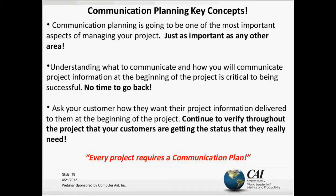So many project managers are reactionary when it comes to red or yellow status — I strongly suggest you put that in your communication plan before the event ever happens, and you'll be able to react accordingly. The key point here: every project requires a communication plan. You'd be surprised how many projects miss that. A lot of people think a status report is a communication plan — it's really not. It's really important to get that locked down.